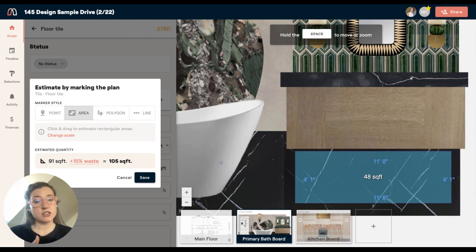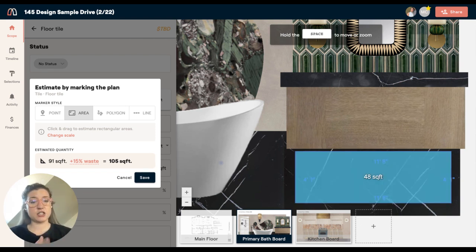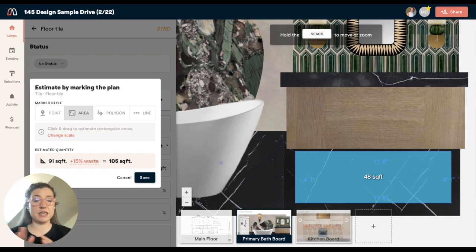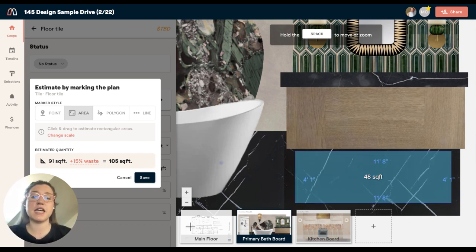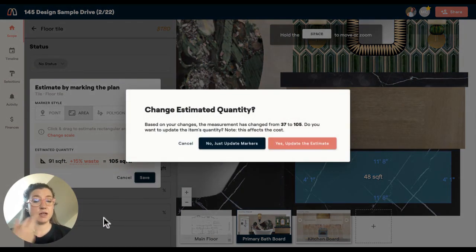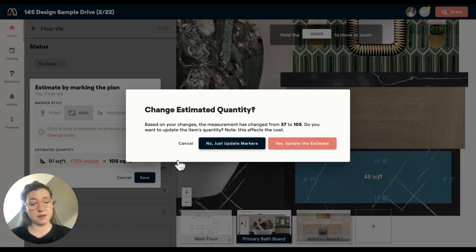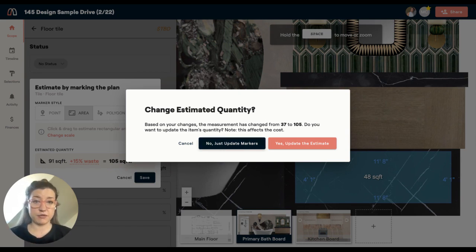I don't actually want to add 48 square feet to my estimate. I just want to highlight and connect the pieces that these are the same. When I save this, Materio is going to ask me if I want to update the estimate or just the markers. In this case, I'm just going to update the markers because I don't want to increase my square footage.